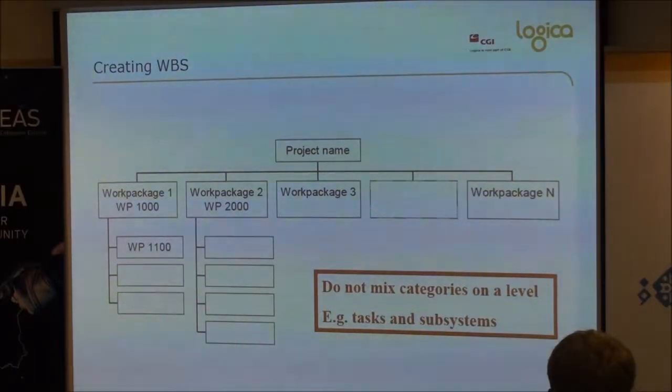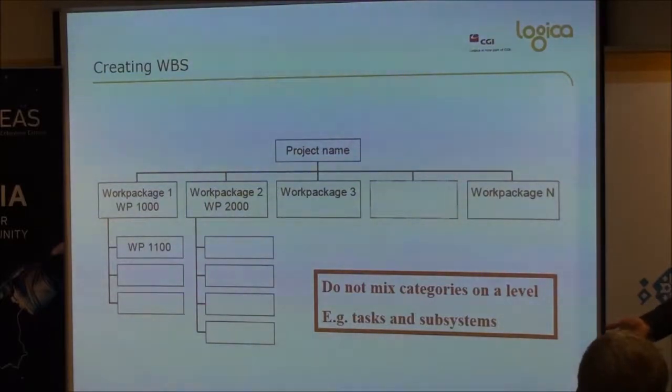Anyway, keep things clear, keep things precise, break down as you want. There is a penalty, well, not a penalty, but the more you break down, the more burden you'll come to when you do your finances. Yeah, because there is a direct relationship. So don't go overboard if you don't need to. Be clear amongst yourselves on what you're doing. But don't go to finite level if it's not required at this point, yeah? Because that does affect how you respond financially and how much effort will be required.